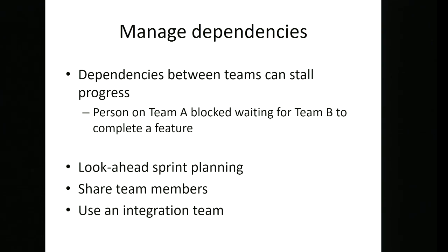It's just slightly, I think sharing team members probably thinks about dependencies a bit earlier and a bit more in the loop, and with an integration team, you might still have issues where you say, this interface just hasn't been implemented quite right for these things, so there's going to be a bit of an issue. But I think sharing team members will catch things earlier. But hopefully they pretty much do the same job.